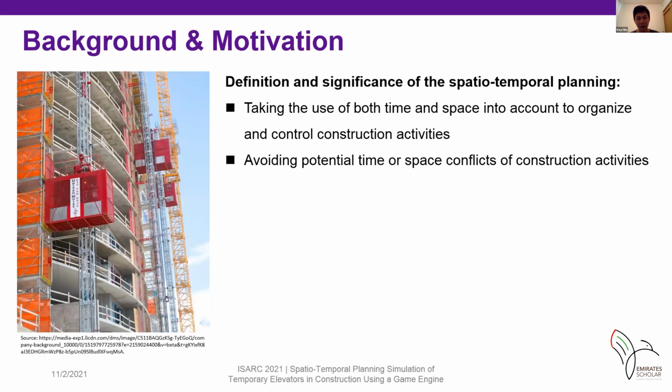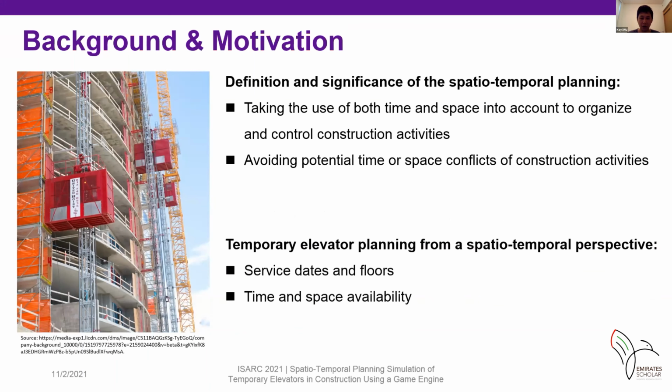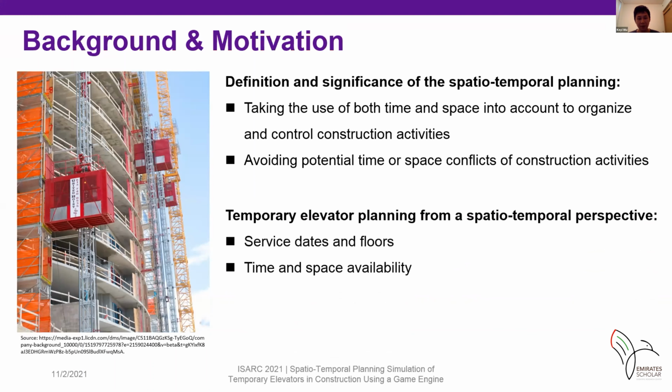In recent years, the concept of spatial-temporal planning has attracted a lot of attention. It takes the use of both time and space into account to organize and control construction activities, so it can avoid potential time or space conflicts that lead to various challenges such as safety, quality, delivery, and cost. With this perspective, it's beneficial that temporary elevator planning considers service dates and floors and the time and space availability of relevant planning elements seriously.